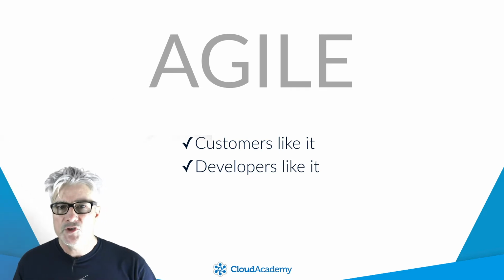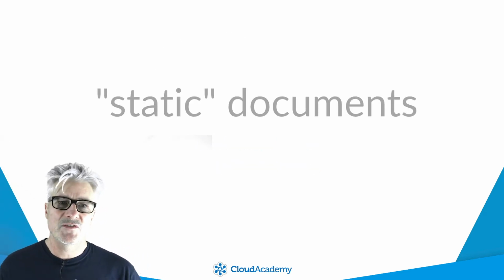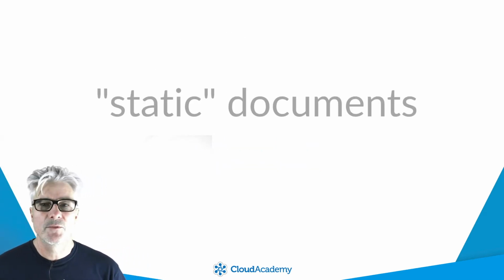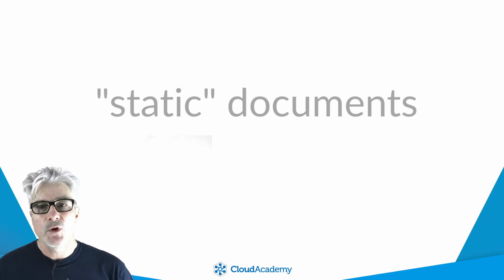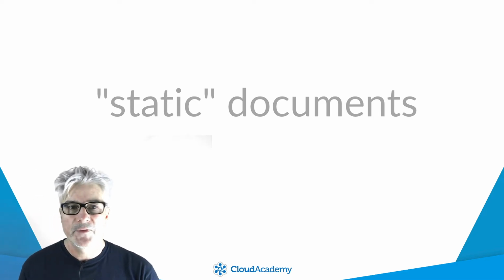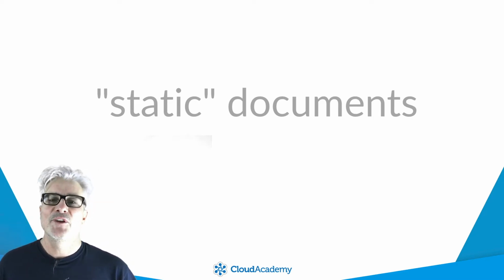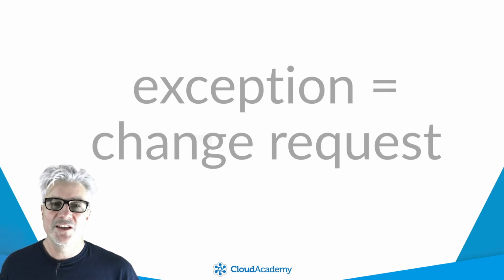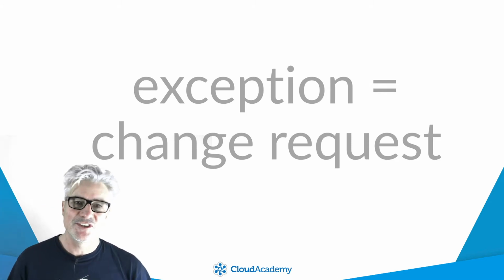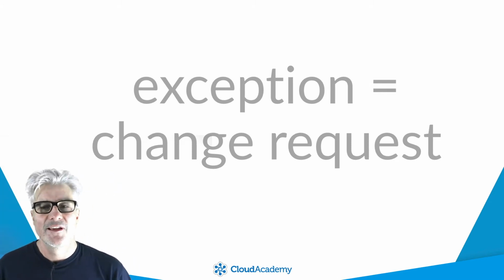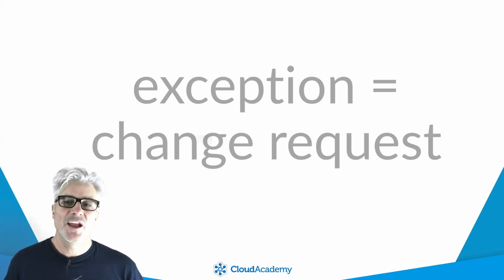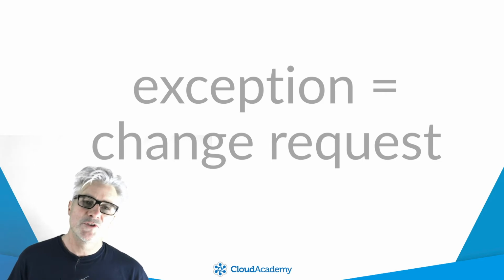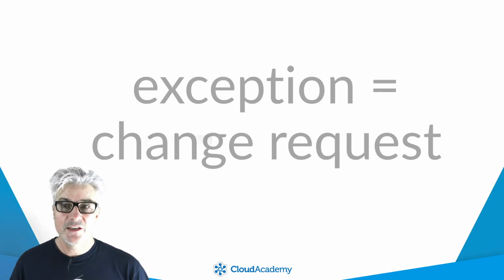The most improved change for me was moving away from having a static project specification document, as inevitably the requirements of the application would change as we all learnt more about how the end users actually needed to use this software. As the developers, that meant we would actively discourage any change from that specification. Change was seen as a problem. We immediately labeled any change an exception. An exception meant we had to renegotiate the overall project timeline and budget with the end customer.